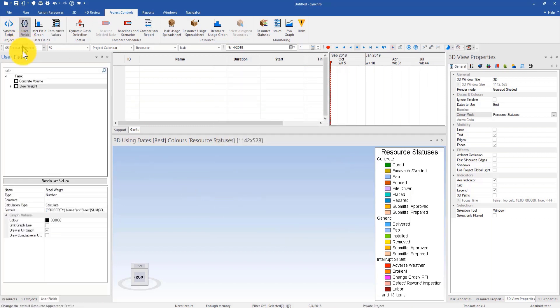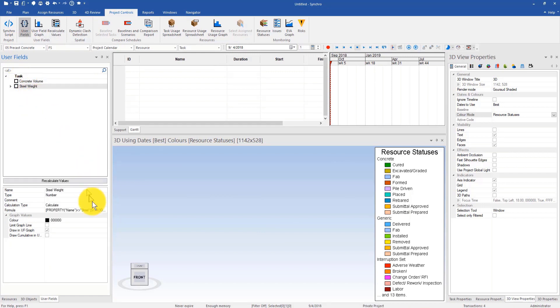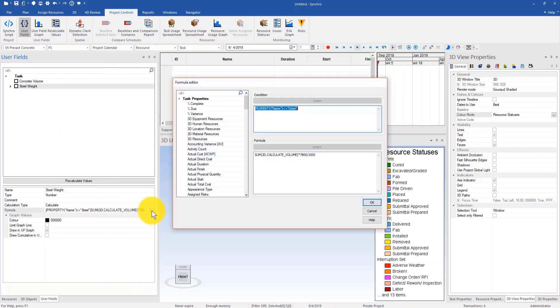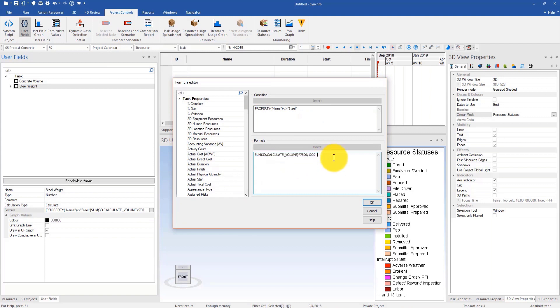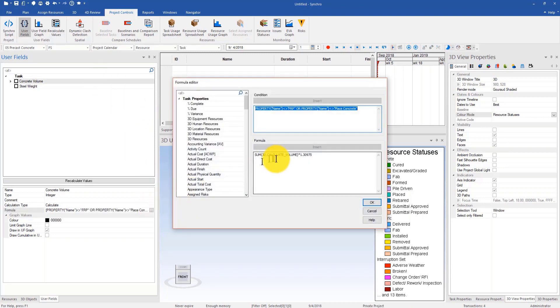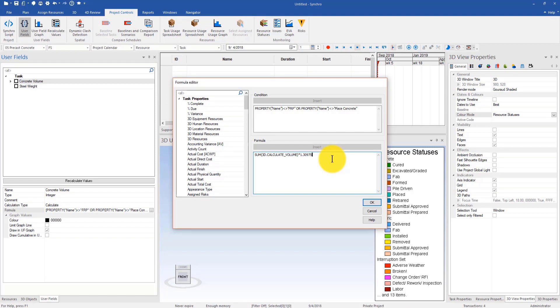Right now if I open the user fields window, you'll see that I have two task user fields imported. Each of them contains a formula. If you open it you can see this is the formula that I have in there to compute the steel weight per task. Also in addition I can take a look at the concrete volume formula. Those formulas are just for your reference and to help you understand the user fields with formula that were built in a past Synchro project can also be imported into a new Synchro project.